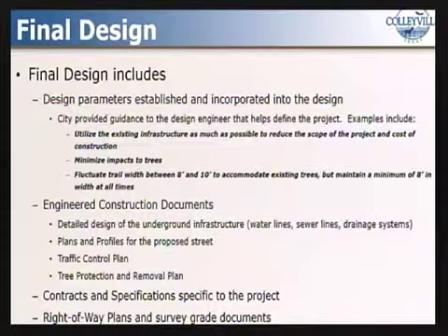The final design stage also generates the construction documents. This includes several different items that are needed in order to construct what was conceptually considered in the previous stage. This is also the point when the extent of the needed right-of-way is established.